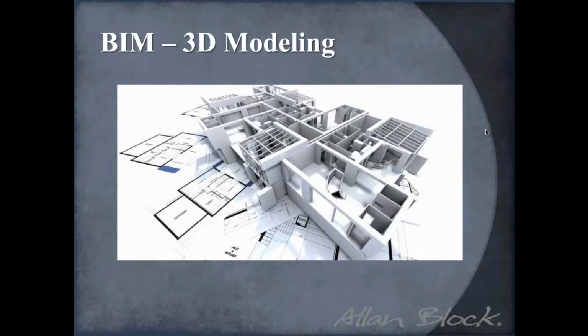And by doing this, what you're really doing is making sure that you have less change orders later on in the process. You're making sure that everything flows freely and works well together, and that way you don't get surprised later on in the process when you're installing and you come across a spot where a water line was supposed to run straight through an HVAC, a venting system. But so that's the usefulness of BIM.